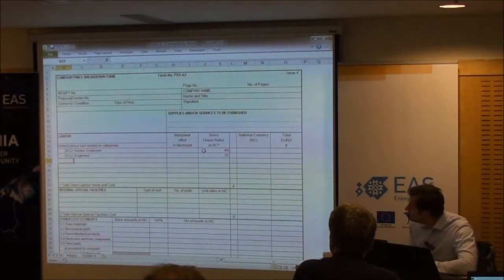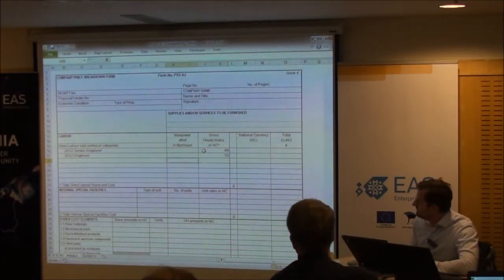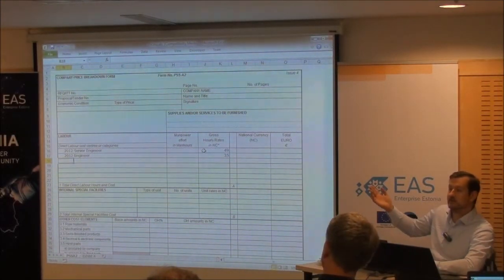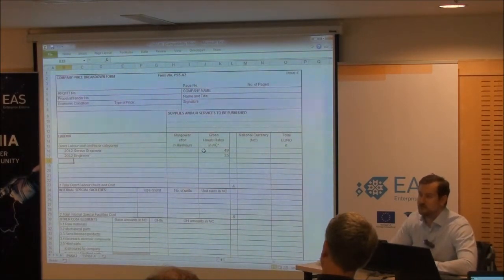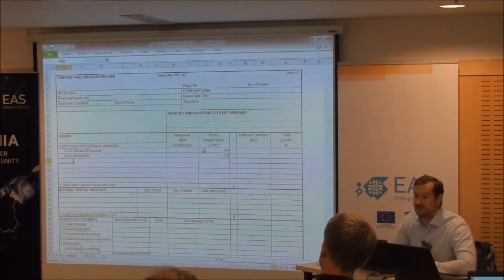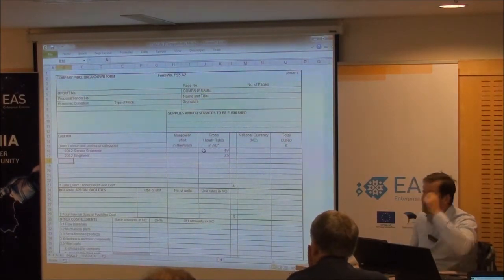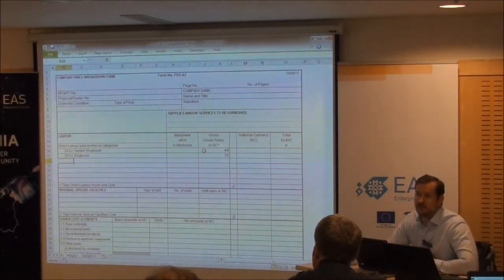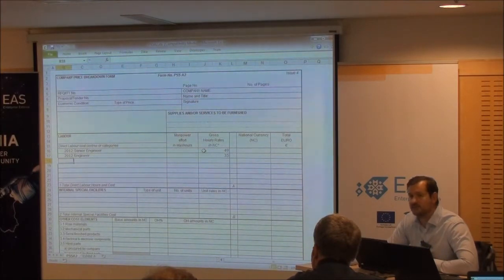I won't inflate the rates, but you would typically see those repeated with the year 2013 with some uplift. You're more than welcome to put in for a 10% inflation, but I suspect that will be pushed back. Basically, they'll just ask you what you're doing with that. So think about it. I think the ESA will generally use statistical data to understand what that is likely to be. You can ask them what guidance organisations they use for that, but I think at the moment it's around 2 or 3%.